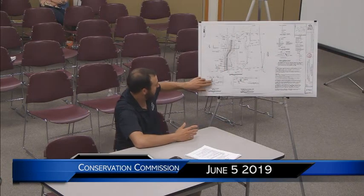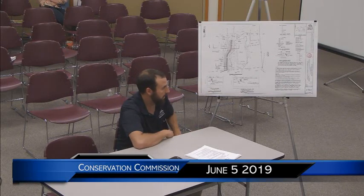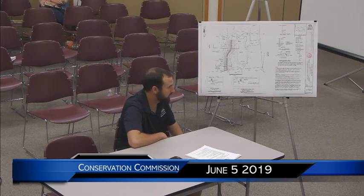Just matching an elevation to the top of the stones and, in the design, just marking where it's going to go. Is that on the profile itself here? Yeah. I just think the only difficult part of that is we show this typical detail, but these angular stones are very difficult to set exactly as shown there. Right. So when we've done this on projects, the contractor has built the revetment, and wherever the toe stone or rock works, right at the existing grade, we have a drill hole set there, and then we can write down the elevation, maybe on an as-built plan.